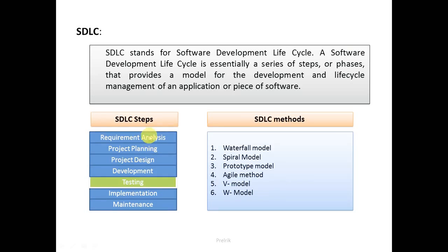Once you have passed one step, like if you have passed requirement analysis and started working on project planning, then in the waterfall model you cannot go back and you cannot make any changes if the requirement changes further. This applies to all the phases. If you have started development and a further requirement occurs, you cannot implement it in the current release or development cycle.